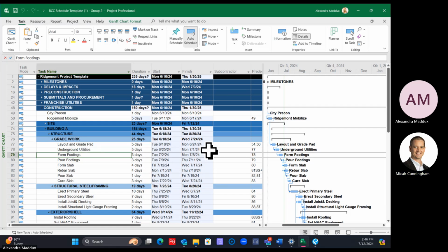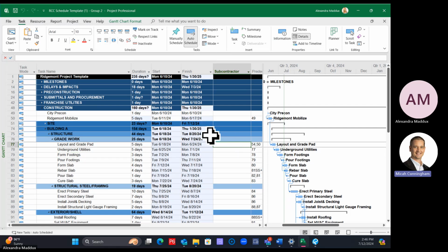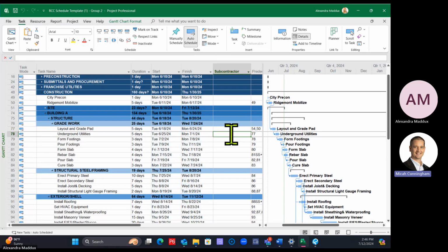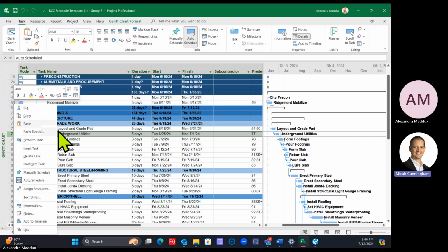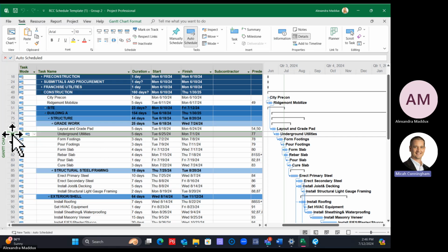All right. So with that, go through your building and assign your subcontractor to each activity. So in this case, I get to underground utilities, and actually, this is 2. So what I can do is keep the logic in here and keep the duration. I'm going to copy this whole activity. So I'm going to click the whole row of underground utilities and copy it.